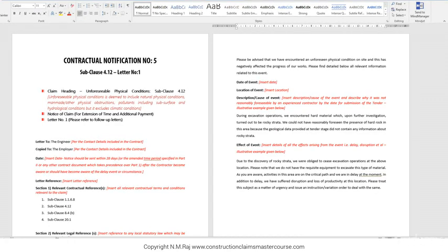Impact to the subclause 8.3 program. This is extremely important. You have to identify the activity which was affected by the compensation event. I've seen a lot of contractual notifications which do not contain this important piece of information. So please do make sure that you enter all the requisite data related to the compensation event's effect on any activity in the program.